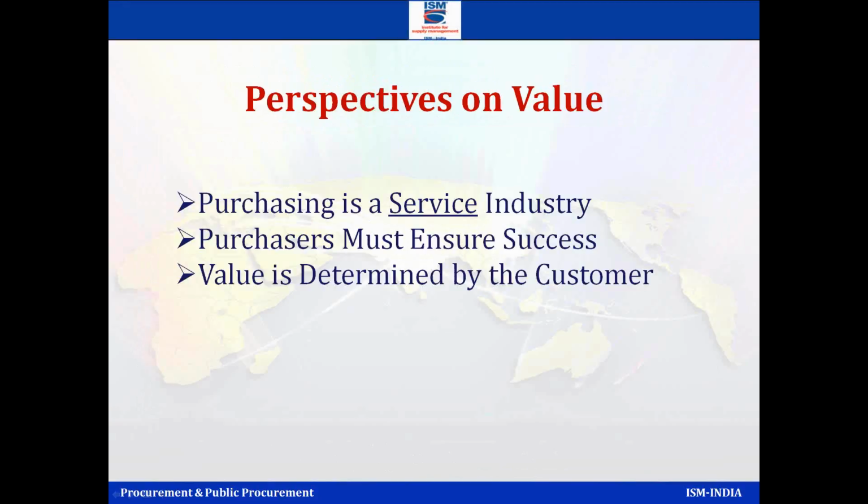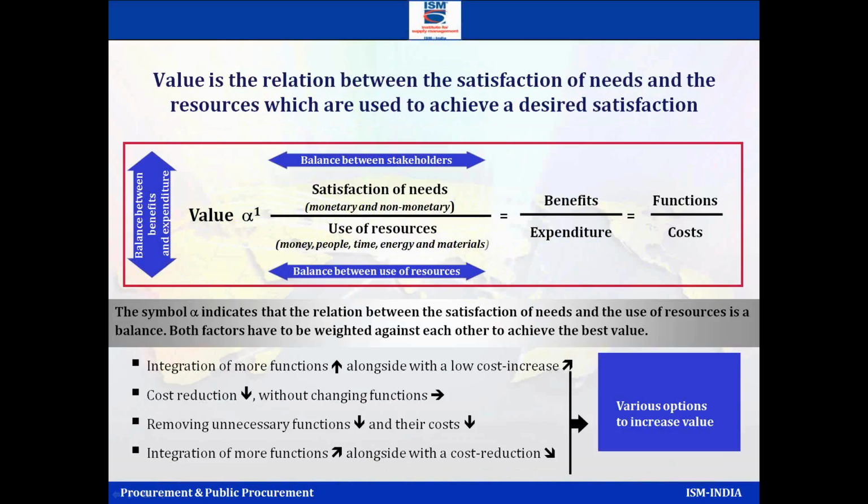So purchasing must ensure success. Value is determined by the customers. So this gives you the definition of values. Value is nothing but the ratio between the benefits divided by expenditure, or function by the cost. So if two items I'm looking at, their cost could be X and Y, but the function, the benefits I'm getting, it's a ratio of the two, and that's how you decide, oh, this is value for money.